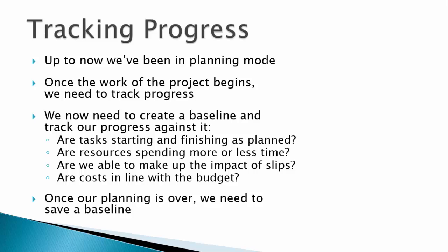This will be useful information for future projects with similar tasks. If there are slips, will we be able to make up the time? Are we in line with the budget? And if we are behind budget, is there anything we can do to get back on track? So the very next step at the end of planning is to save a baseline.